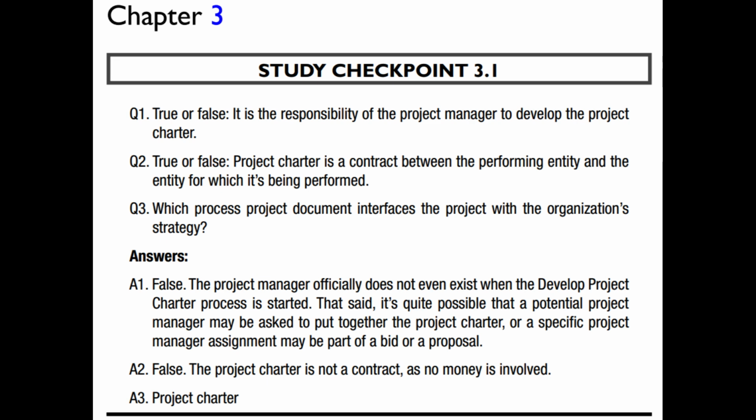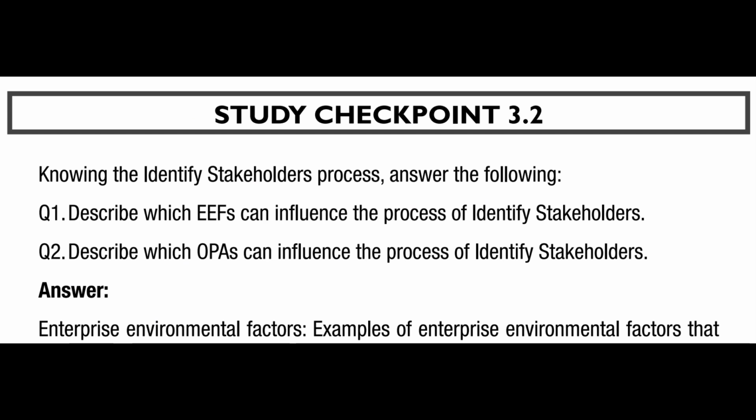Answers. A1. False. The project manager officially does not even exist when the develop project charter process is started. That said, it's quite possible that a potential project manager may be asked to put together the project charter, or a specific project manager assignment may be part of a bid or a proposal. A2. False. The project charter is not a contract, as no money is involved. A3. Project charter.